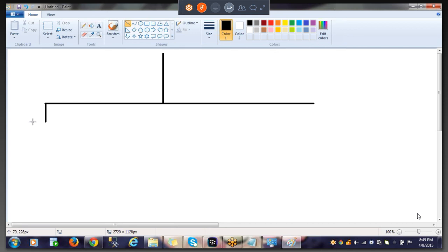Okay, making sense? Already a part of the work is done and delivered. Now the team has taken another part of the work. Now if this work has some change requirements, if he wants to make any changes to this particular work, then he has to hire some other resources, some other team to get these change requirements implemented. And also he has to ensure that these requirements are meeting the billing section also. Making sense? Also, you don't know beforehand if the two systems talk in sync. That is another point.